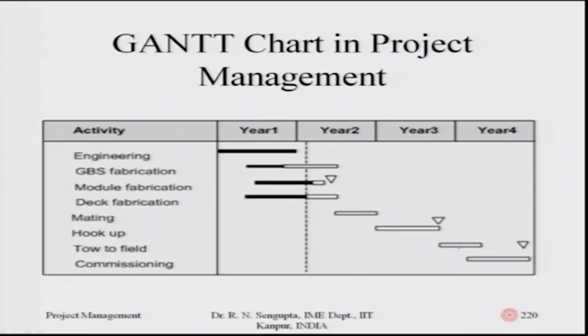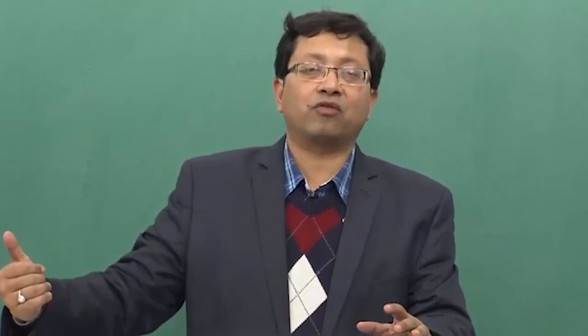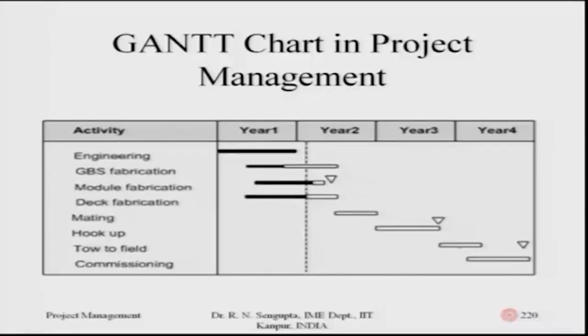Then the fabrication part, if you are building a building or a bridge, again will take a long time, but the fabrication work only starts after the engineering work has started. Obviously, that is true. But it need not start when the overall engineering work is finished, because there are three important parts of the overall project: part 1, part 2, part 3. The moment the overall design for part 1 is finished, the fabrication work for part 1 can start. So the delay you are seeing here is not a delay.